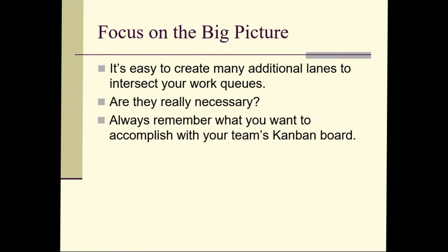So one lane could be project A, another project B, another project C, and you can juggle how much of which items you're working on for each of the projects. So maybe this week project A is urgent, so I'm going to work on 3 things for project A, and there's just one element from project B that I'm going to work on because I have to show that I'm continuing progress on that one. And maybe this week I'm not going to work on project C at all because it's not as urgent as those other 2 items. Maybe that's okay. Next week it might be mostly project C.